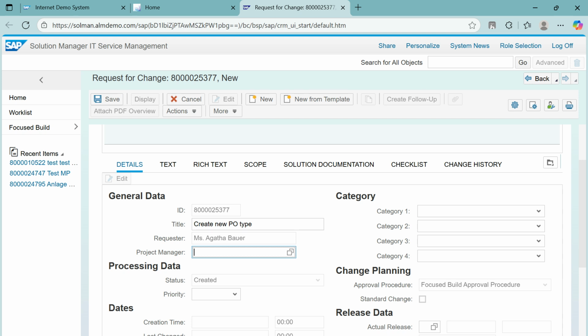And the next thing is the project manager. In some cases, we see change manager here. The field name might be different in some other cases. Change manager, project manager. Okay, so once we create this task, it will go for validation to that manager only. He will be validating all the changes that we are going to make, and he will approve if everything's fine. If something is not right, he will reject it and give the reason for that. We need to work accordingly.